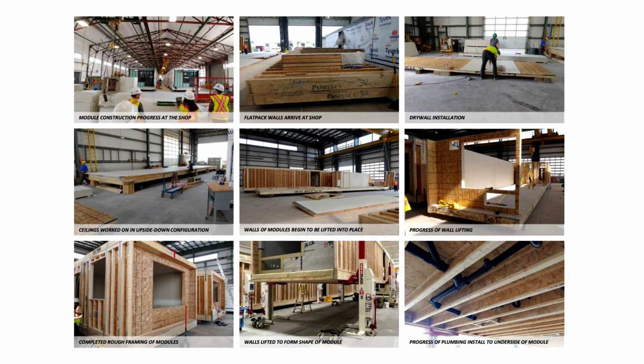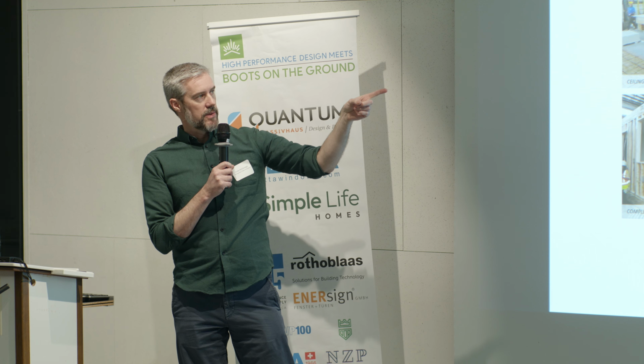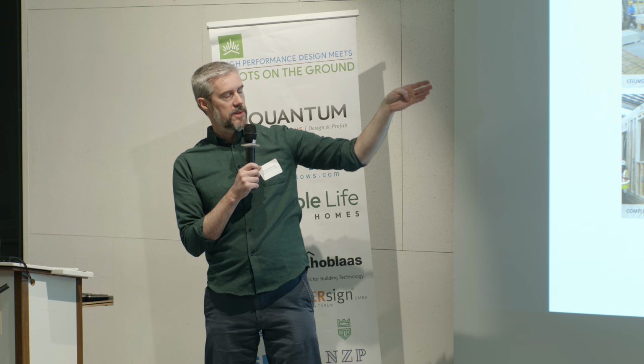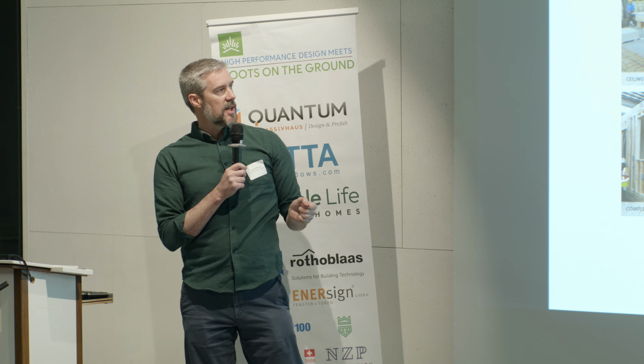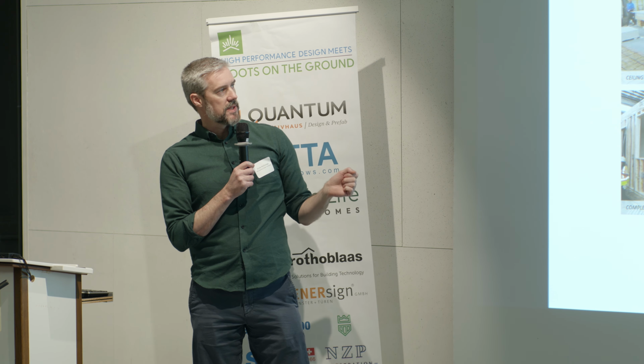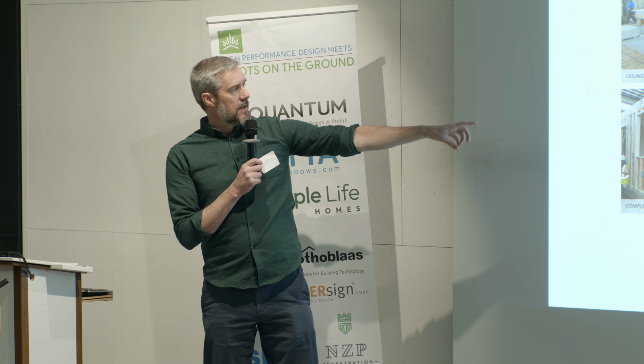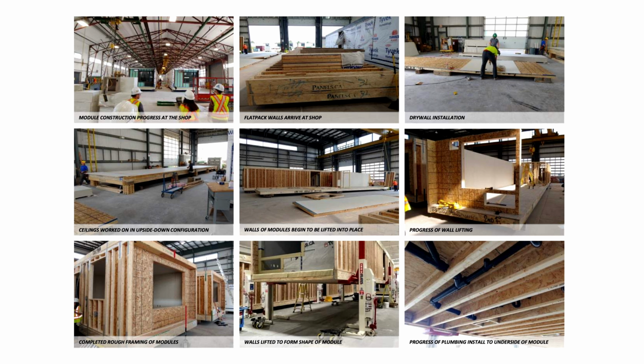Photo on the right. Interestingly, what you're able to do with this is we were using modular shower units that get the acrylic enclosed on three sides, and so this was the point when we would half of the modules up that they would get dropped in, so you weren't hauling them through doors and upstairs and everything else in the building process. So they got dropped in. The completed rough framing on the bottom there.